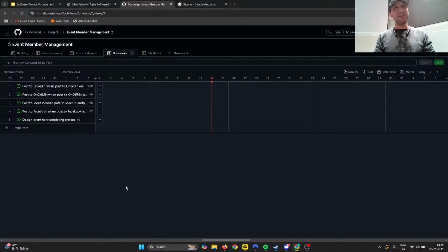I hope you're right. Milestones and all that stuff in there, so you can track how much of this feature that is being developed, how far along it is. Like, is it 50% done? So, given the milestone that you create, you attach different issues to that milestone. So you kind of track it. Okay, 50% of this is done.